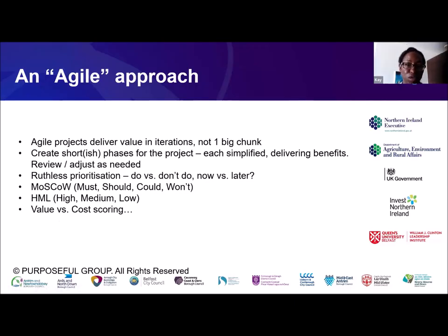So another thing that I would suggest for you, being smaller businesses, is to be agile, okay? And agile is a set of principles around how you build a digital project, so to speak. It started out with a group of experienced developers that came up with this agile approach to software development. And it's become so popular that even outside of tech, people are using agile approaches within their businesses, within their teams, etc. So agile projects don't try to do everything in one go, okay? They break things into small chunks and they try to ensure that there is value in every small element that they deliver. So we don't wait forever and ever to get the benefit. We split a project up so that we get small elements of benefit all the time throughout the project until it comes to a close, all right?